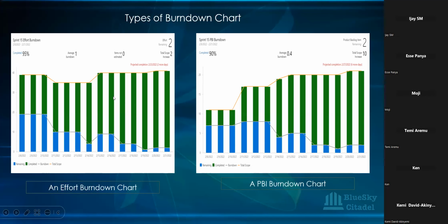And that is what your chart will pick up and give you your projected completion. So at the pace at which you're burning, it's going to take you 2 more days to complete. It's going to take you 6 more days to complete, because it's looking at all those flat times. And what that is telling me as a Scrum Master is: does this mean my team didn't do anything for these 3 days that are flat? Is that why things are not burning?